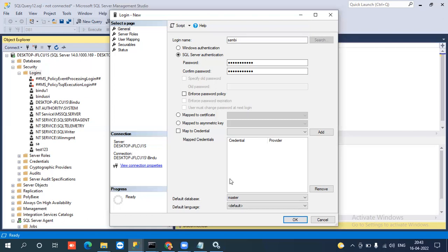If they don't ask anything and you take your own decision and change things, that will be a very big problem in real time. Every change, even one letter, needs a change request. There are no decisions of your own. Your own decisions are valid on your personal laptop if you are practicing or installing. When you are working with any client or project, you don't have any right. Everything requires evidence. If there is no evidence, maybe not immediately, but after 1 day, 2 days or 2 months, if any escalation comes, they will track your records and you will be in trouble. So don't take risks.